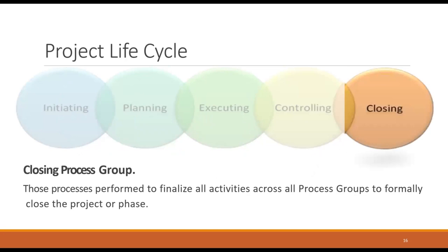You will conclude project activities, turn the finished product or service over to its new customers, and assess the things that went well and didn't go so well. It will also be a time to celebrate your hard work. The steps include conducting retrospectives and taking notes of changes you can implement in the future, communicating to stakeholders the end of the project and providing an impact report, communicating with the new owners of the project, creating a project closeout report, and celebrating the end of the project and your success. The tools are the impact report and project closeout report.